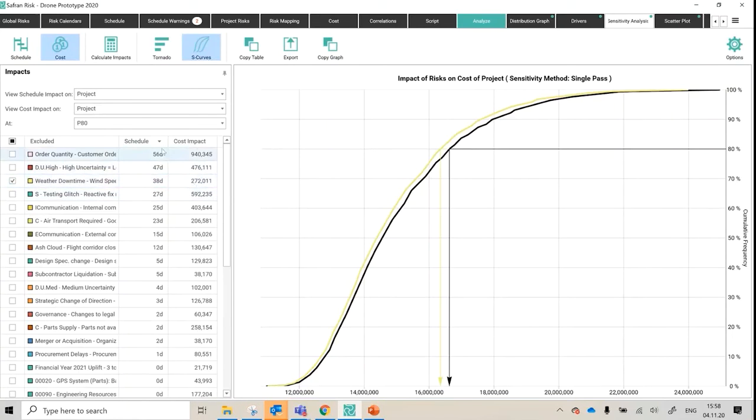It was very useful. And if you go to the other end of the spectrum, you can see in the tabular form the outsourcing opportunity that we talked briefly about on one of the slides. If you remember, the opportunity I think was a £5,000 upfront investment and an additional 5 days of time. Well, the net effect is I'm actually saving 4 days overall, despite an investment and taking 5 more days. It feels like it's going to slow me down, but actually outsourcing it was a smart thing to do because of the big time savings elsewhere. And furthermore, that £5,000 converted into £122,000 of savings.